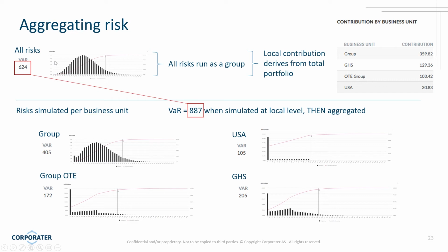Now, part of it is there might be just a few risks at some of these local levels. That's also why these histograms look a little bit strange, because you're getting a lot of zero values and so on. But that's really beside the point. The point is that it skews the data. The same principle applies regardless. But of course, you will end up with more outliers when the groups are smaller, which push the values at risk higher for each level.